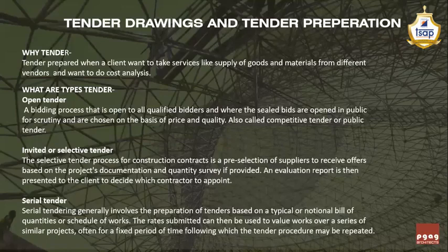Now, in case of invited tender, the client is aware of who are the contractors who are best in that particular work. He gives the invitation only to the selected contractors, and the bids are invited only from the selected contractors.